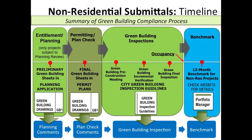In this slide you'll notice the timeline for a typical non-residential project. On the left hand side you'll notice the planning and entitlements phase, and this is only for projects subject to planning review. Some projects will come in right at permitting and won't be subject to planning, but if the project is subject to planning then we will need to see preliminary sheets included in the planning application, in the form of a GB1 sheet.